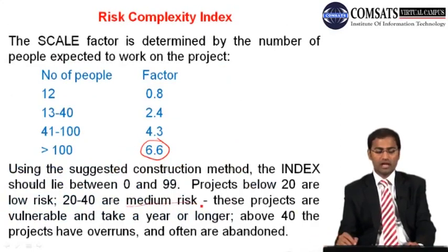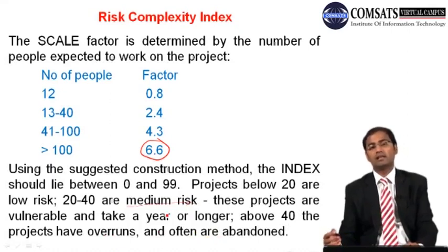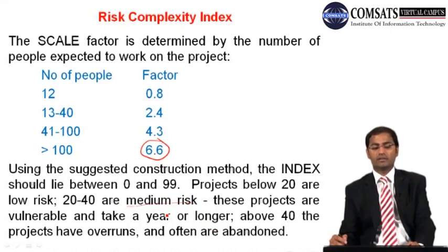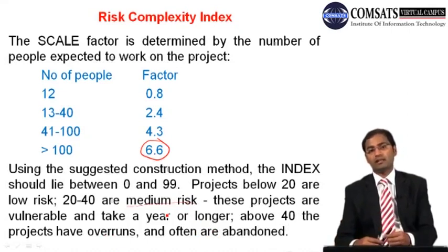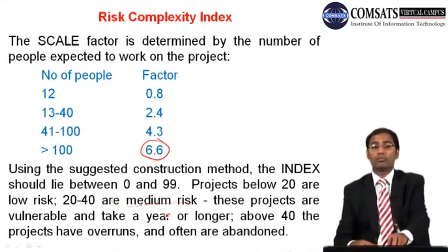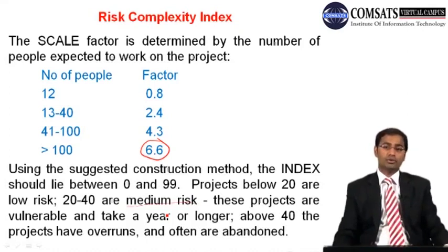These projects are vulnerable and take a year or longer. Above 40, the projects have overruns and often are abandoned. So this is very important. So this method, you can customize this risk complexity index method for identifying the overall project risk for your own project, and you can have a customized setup for that.